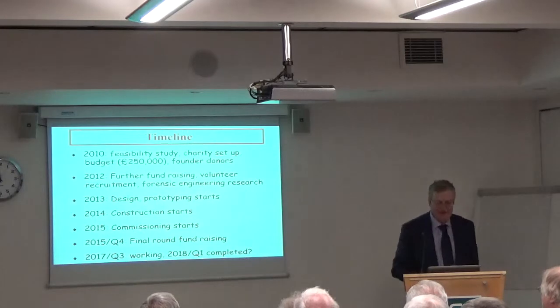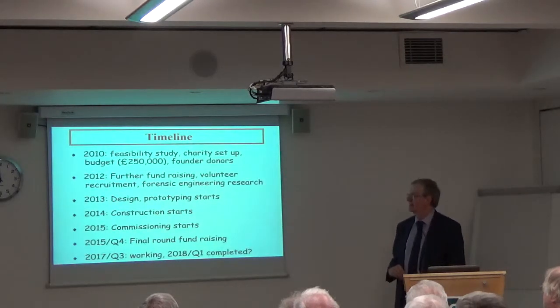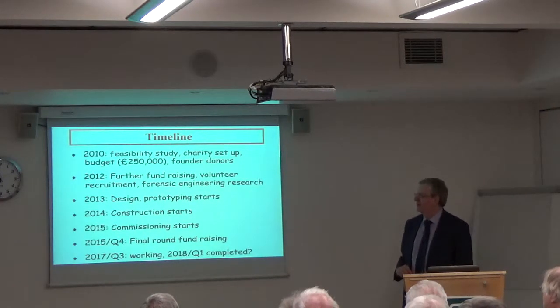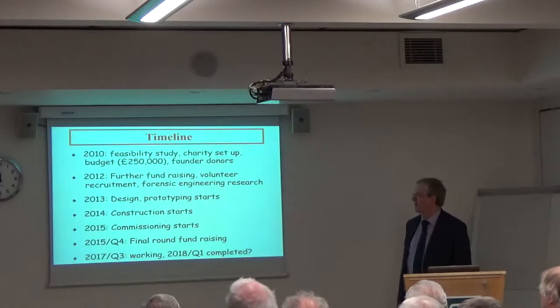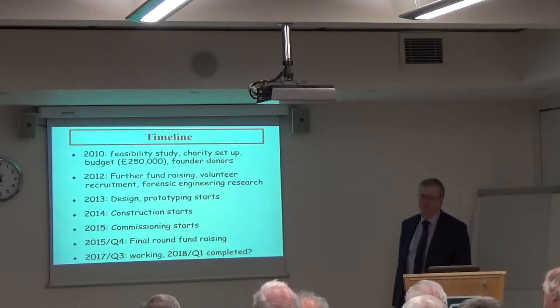So where are we? We started in 2010 with a feasibility study. A charity was created so we could go fundraising. We raised, I think, slightly over £250,000, helped by some founder donors who put some very large checks in the hat first time round, which is nice. We had a second round of fundraising, recruiting volunteers, mostly through CCS, but also people turning up at museums saying, can I be part of this, and personal networking. Two years of forensic engineering research, and then starting design with a lot of prototyping of circuits and evaluating them.